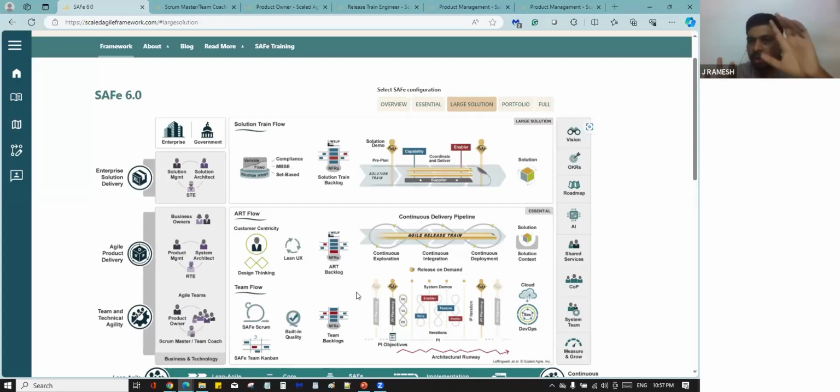Scrum Master just watching. He is also facilitating this. Now, retro. What went well? What did not go well? What are the action items? Three main columns. It's a qualitative, quantitative analysis. Everything happens in the retro.